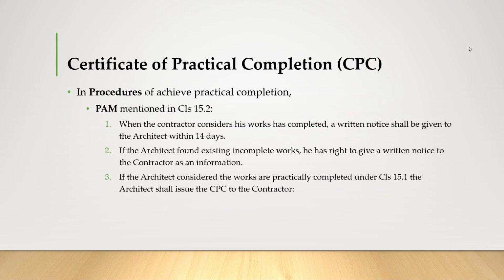So the procedure to achieve practical completion in PAM is mentioned in clause 15.2. When the contractor considers his work has been completed, written notice shall be given to the architect within 14 days. If the architect finds existing incomplete works, he has the right to give written notice to the contractor for information. So lastly, if the architect considers the works are practically complete under clause 15.1, the architect shall issue the CPC to the contractor.